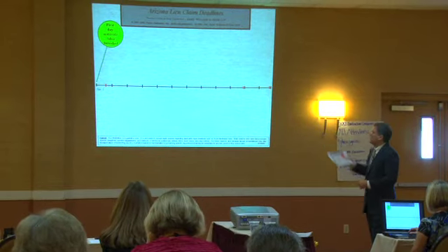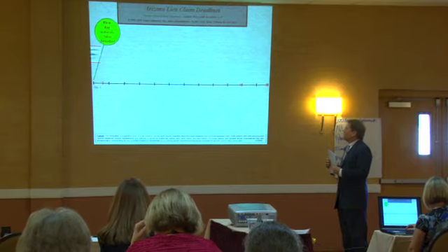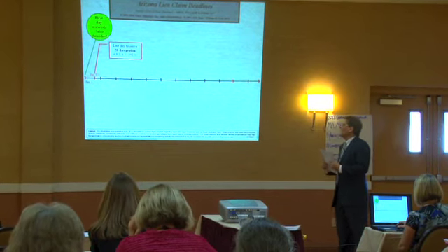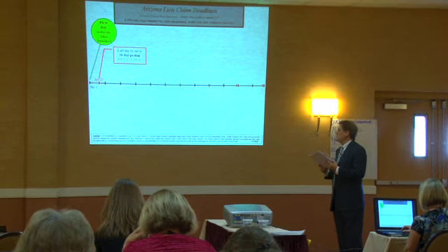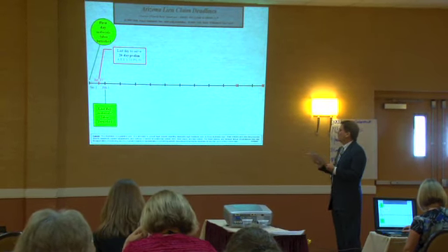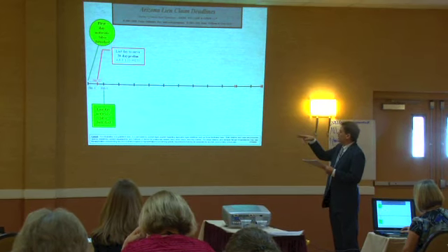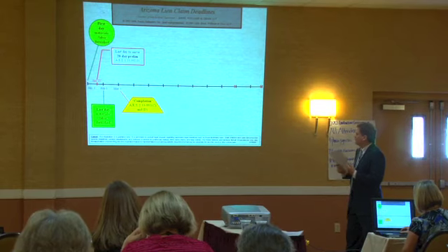But you supplied materials on January 1. The next action item date is going to be January 21. That's the last date you can serve your 20-day preliminary notice under Arizona statutes. Now, the last date your materials and labor were furnished, because you supplied a little more paint on February 1, is the February 1st date.